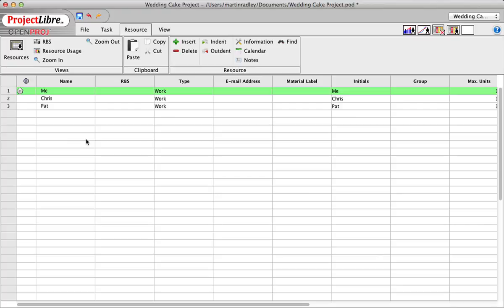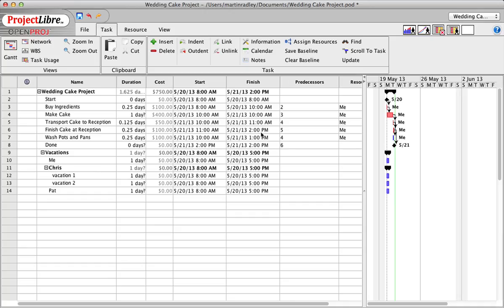Okay, so the fourth one was that there were no resources entered into the project management tool multiple times. So the fifth one is that there are no dangling tasks. This is what I call a dangling task: a task that has no predecessor or successor. What that means is that every task is associated with our getting to done for this project.